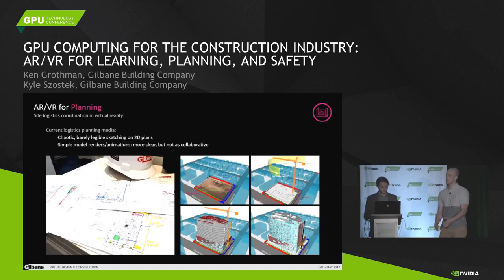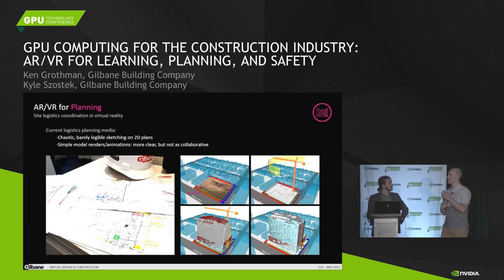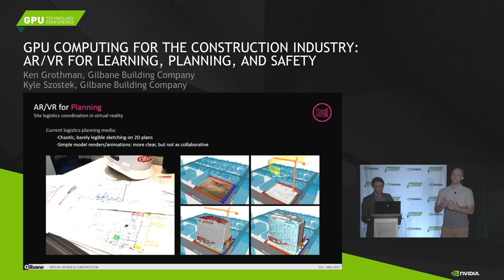Another major area where we're starting to leverage VR and AR is the site logistics planning phase we go through on every project, kind of before we get boots on the ground and shovels in the dirt. Traditionally, this task is a bit erratic — going from digital plans to hand-sketched overlay drawings that don't have great defined scales. There are assumptions being made at this stage that, if not done correctly, will affect and impact the rest of that job's lifespan. By bringing in the AR and VR world, we can much more accurately represent what's being planned and show it in a way that is much more expedient in explaining the idea and the process we're going to be going through.